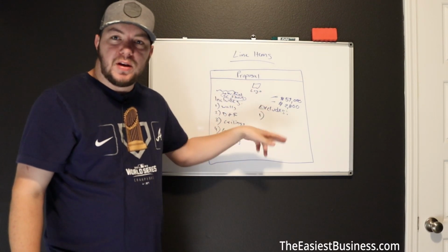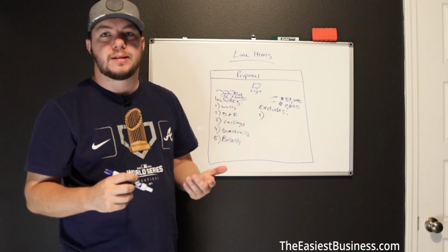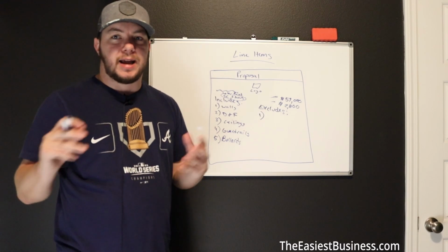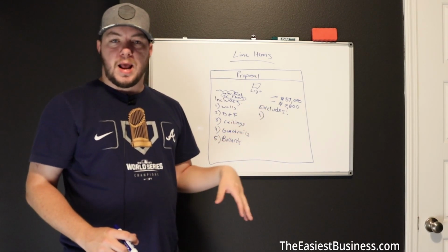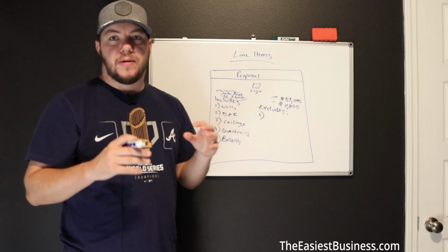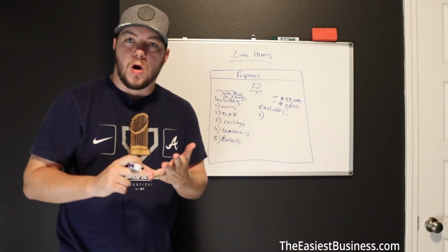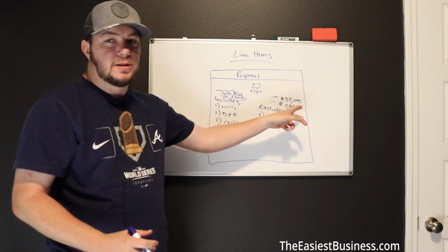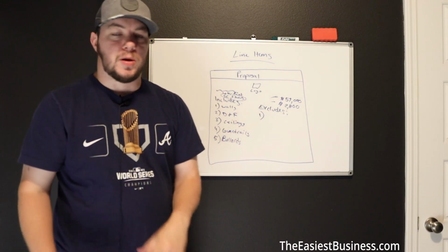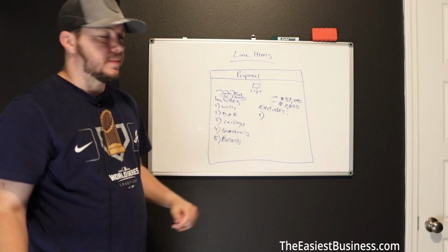So I'm gonna specifically exclude it so they can't try to hold that over my head once I sign that contract for X amount of dollars and I get on the job. I don't want them saying, oh, well, you know, painters are supposed to paint this, right? I wanna make sure they know for a fact I'm not painting that. And if they want me to pick it up, they'll email me, they'll call me and say, hey, actually we need you to pick that item up. Can you add it to your total? Then you can revise your proposal and add that in there, take that off, and you're good.